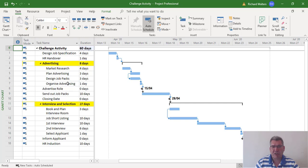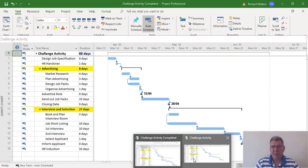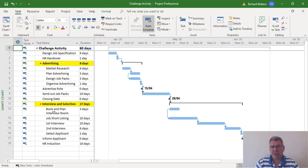We've changed the structure and the challenge activity now matches the completed version we were trying to achieve. It takes a little bit of work - this project only has about 17 tasks under the summary, but if you've got a big project it takes a lot of care and attention. This restructure involved modifying links, breaking links, removing summary tasks, inserting summary tasks, and inserting tasks - quite a bit of work. This completes the training video on modifying links and restructuring a project.